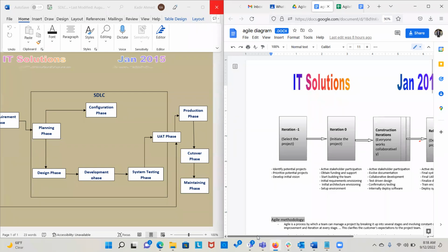And always clarifying, you have daily calls. Before you start your day, you have a daily call. This is where, as a team, everybody provides updates saying what they did yesterday, what they're going to do today, what issues they're facing, things of that nature.